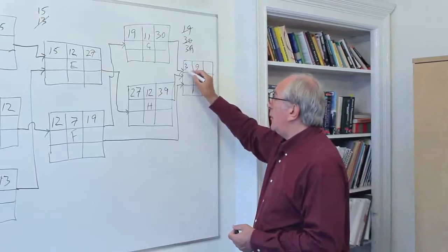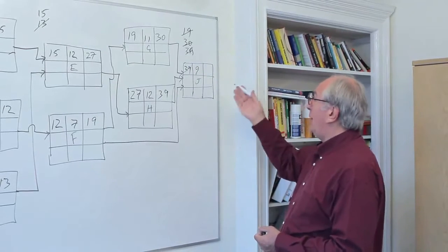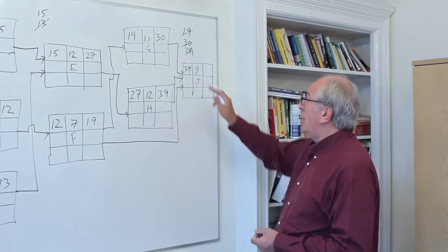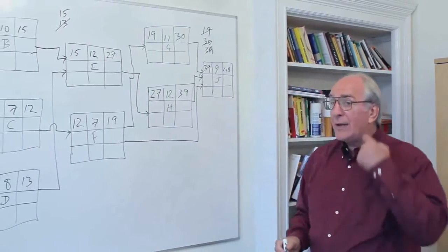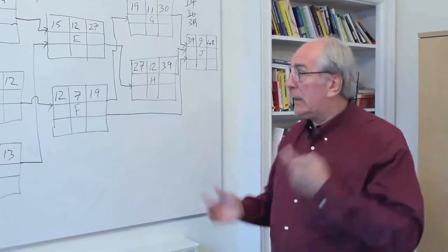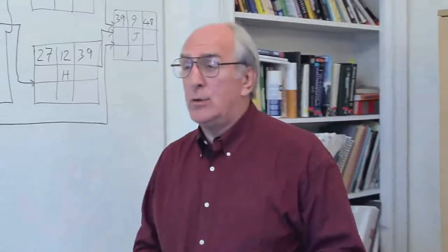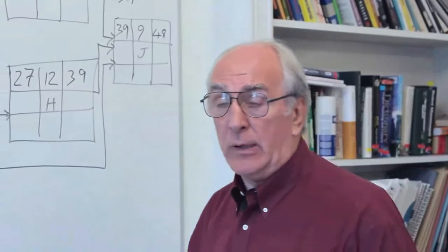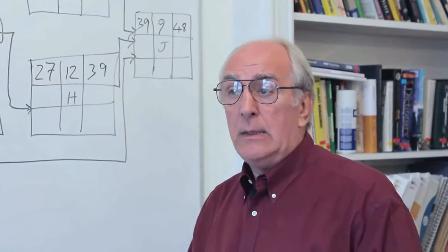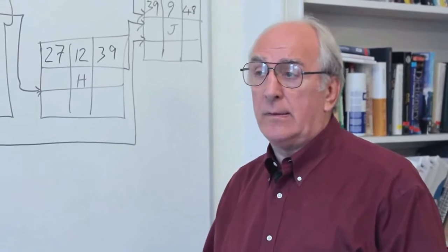So that's our early start for activity J, giving an early finish of activity J of 39 plus 9, which is 48. That early finish, clearly there's only one activity that ends this network in this job. That's the early finish of the project, and that's the earliest time we can complete that project. It's actually the project duration, and it's the fastest time we can do it.